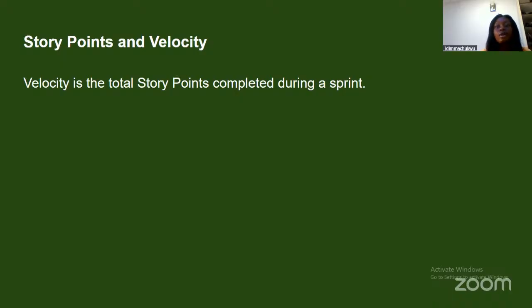You subtract 5 hours from the already existing 40, which is going to give you a remainder of 35. You also think of the meetings that you're going to have in between for your scrum, like the daily scrum for the project, the sprint planning, the sprint retrospective, and also the sprint review. Let's say everything sums up to about 5 hours for the week. You minus another 5 hours, and that will give you 30 remaining.